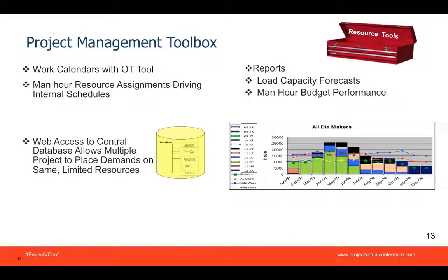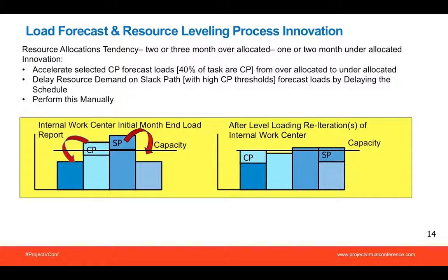Now let's look at the new resource over-allocation innovation, where critical path again plays a key role. You see on this diagram on the lower left-hand side in yellow, 4 bars. It's very typical in manufacturing experience in automotive that the overallocated resources in future months are normally stacked up where they're over capacity for 2 or 3 consecutive months at a time, and they're backed up back to back.